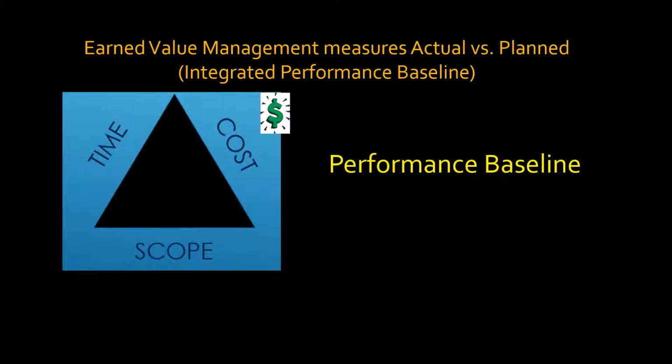A common unit of measure is going to be dollars, folks. It makes sense, right? From the cost side of things, costs are what they are. This is where I'm going to find one of the variables, okay? The actual cost, AC, right here. This is the simplest of the 3 variables to understand, because actual costs are what they are. We see the invoices, we see the timesheets. There's no formula here. We just add up the bills. That's what we do to come up with actual costs. We just add up the bills, just like you do at home. Here's my rent. Here's my car payment. This is what my costs were. You don't have to be a rocket scientist.